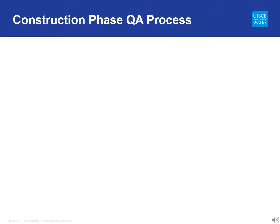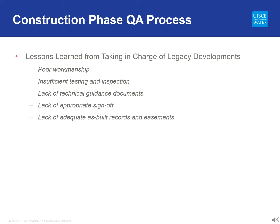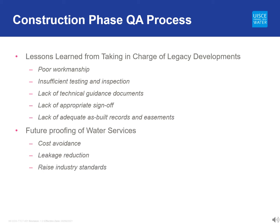The Irish Water Quality Assurance Process covers both design and construction. It was developed from lessons learned from the taking-in-charge process for legacy developments, particularly relating to poor workmanship during construction, insufficient testing and inspection, a lack of technical guidance documents, appropriate sign-off at completion stage, and the provision of adequate as-built records and easements where required. The process will help future-proof water services by using best practices from around the world, helping ensure cost avoidance, leakage reduction, and raised industry standards and site workmanship. We can only do this by working in collaboration with all stakeholders, particularly developers and the construction industry.